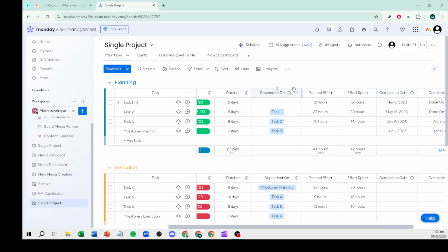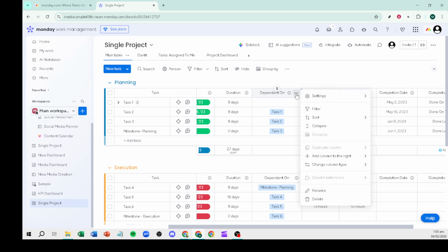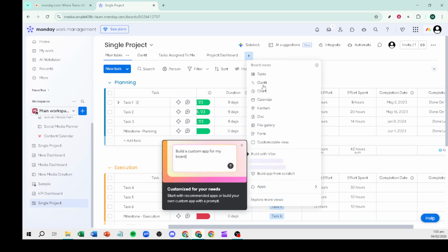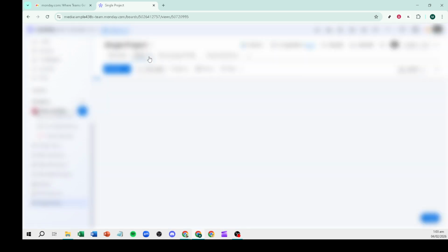Finally, add a Gantt or timeline view. These views translate your items, dates, and dependencies into a visual schedule, making it easy to spot overlaps, adjust timing, and communicate the plan. Update the board as work progresses and your views will stay accurate.